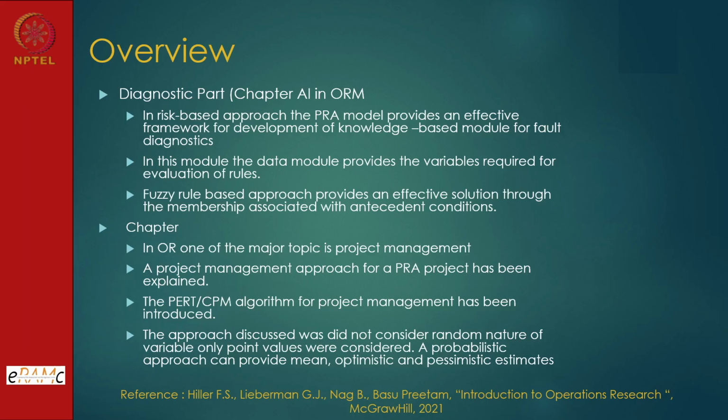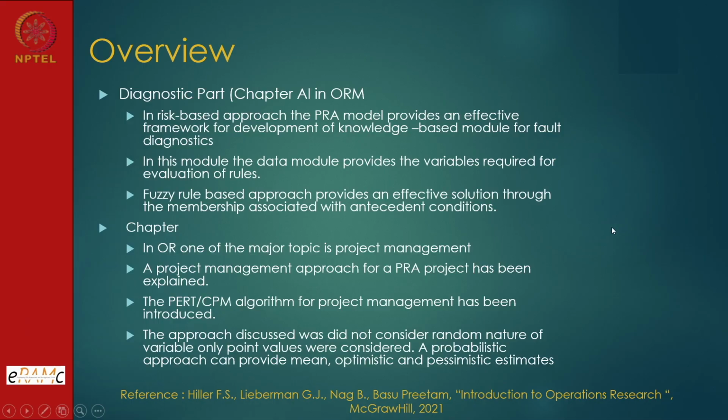So while arguing in the board meeting, we can say I am pretty sure I will be completing in the mean time, that is 34 months, but the pessimistic estimate will be around 50, or it could be 30 also. So I am giving between these two, and penalties can be handled by using this uncertainty type of estimates. This book explains this, but because of time and paucity I could not bring it here. If you are interested, please refer to this book. It is available in the open domain, and open the chapter on project management. Thank you.